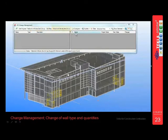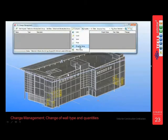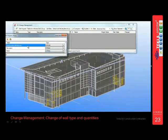Revision E, really simple. They're both loaded into the model. And let's have a look at the kind of things we're after. The name. The name is the type of system, with the drywall and drywall security rated. And the net side area, because you want to know if there are changes to the sizes, if the architect has inadvertently or intentionally increased the amount of drywalling that is going to form part of this change order request. So that information you can pick off.